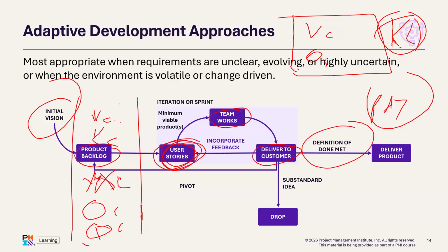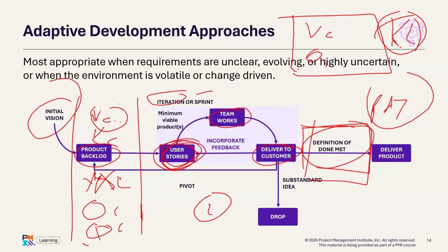Now, all is set. We have defined the acceptance criteria each of the components must meet based on FDA requirements. That's called definition of done. Based on the efforts or the amount of time it will take to complete each of these, or based on the level of information we have to complete each of this work, we will say, okay, the team will commit itself to completing the various backlogs within 2 weeks. That's called iteration or sprint.